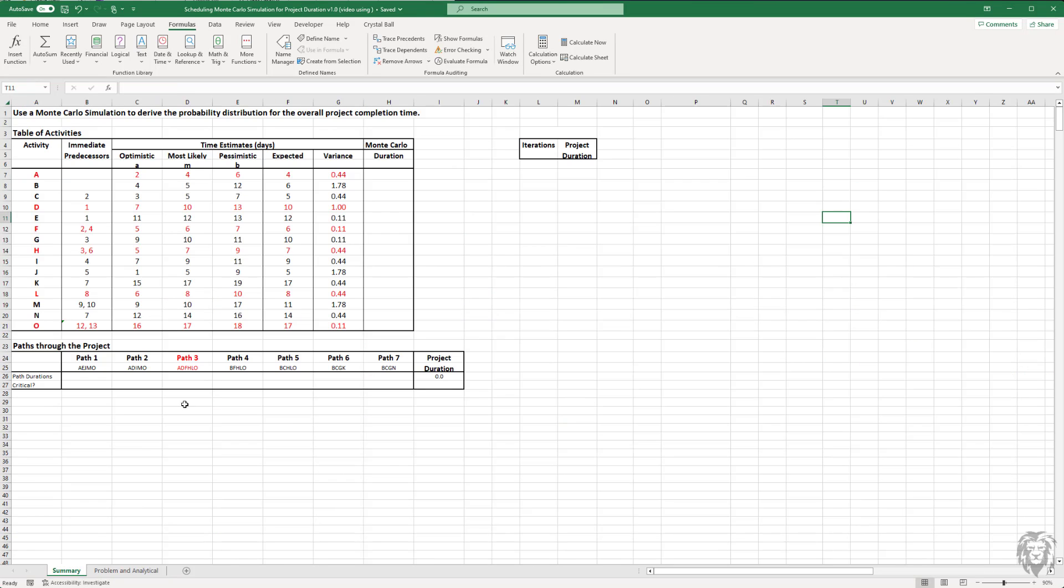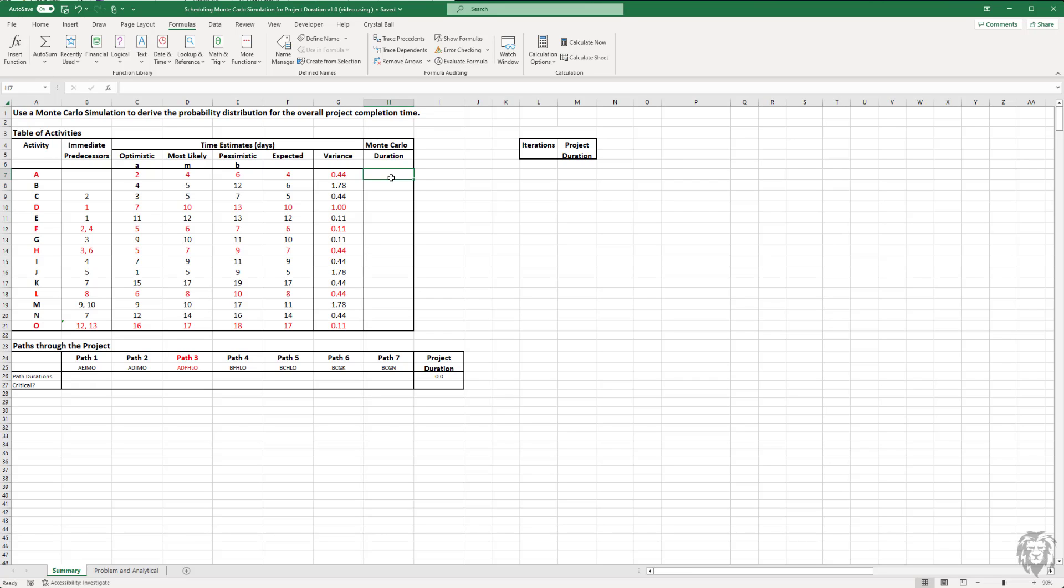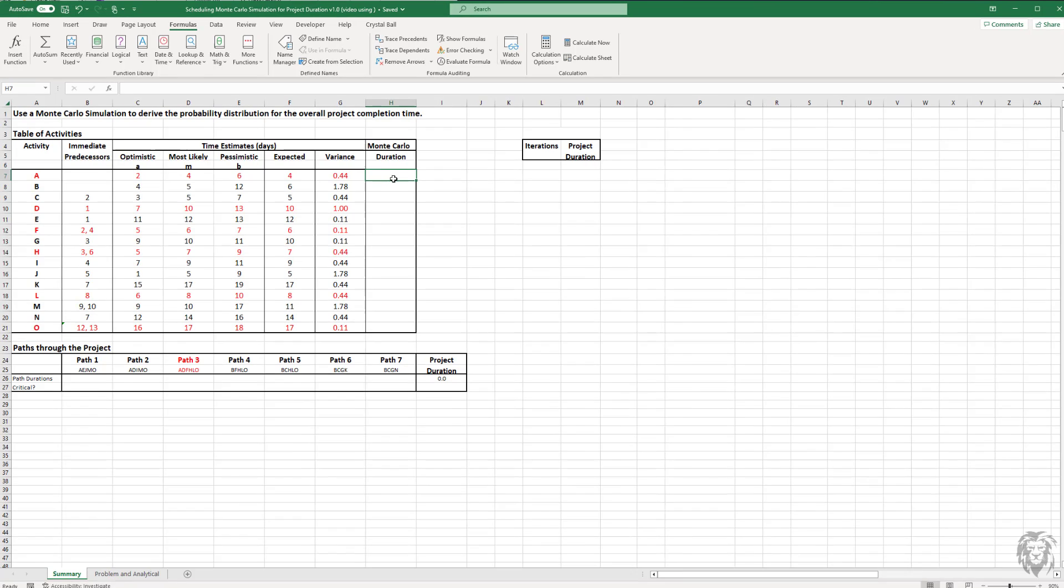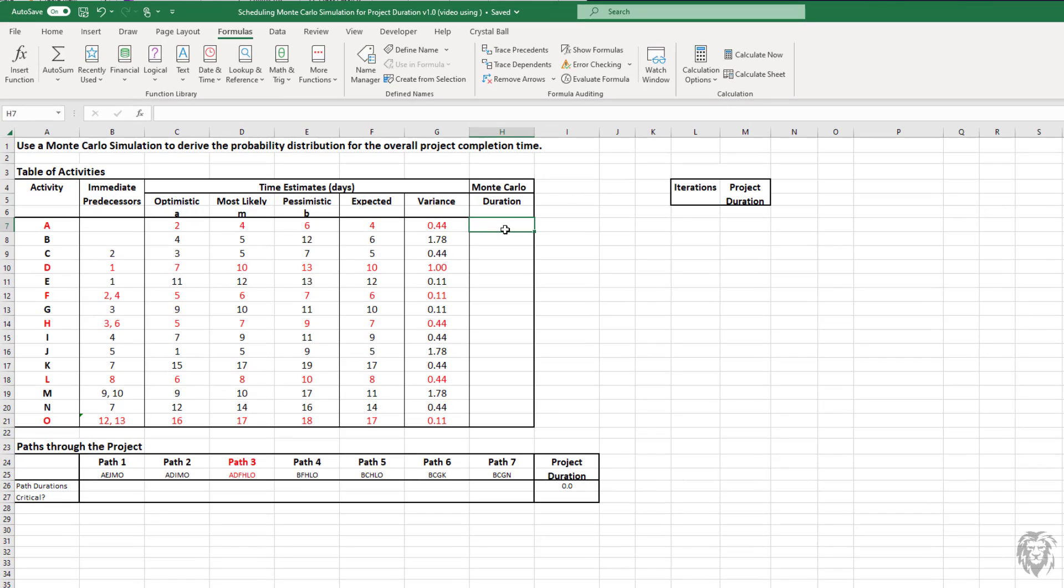Back to our summary sheet where we're going to start. We have our PERT analysis done. We have our expected and variance for each of the task durations copied down. What I need to do is, using a random number generator and the probability, generate different durations or different task durations, and then turn those into path durations and project durations. Then we'll whip those through a whole bunch of iterations to see what Monte Carlo has to say.